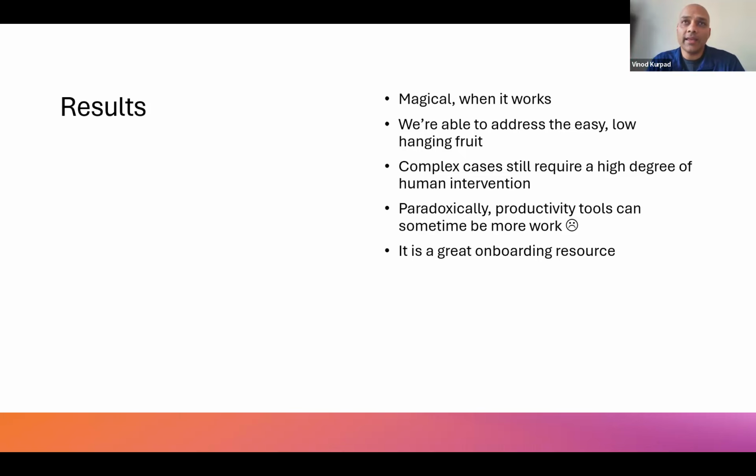Yeah. Our process typically is we define the scope of what we're trying to do. So we write a one pager saying this is what we want to build. This is the problem statement. These are the customers. This is how they are describing the problem. This is the output that we want to generate in order to alleviate this problem, right?